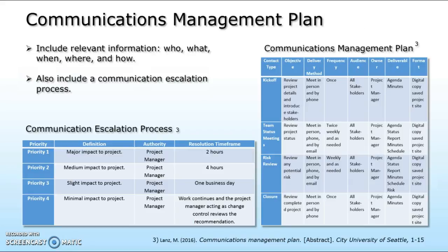A communications management plan is a document that provides a collection and filtering structure that details what methods will be used to gather, store, and escalate various types of information. Procedures should also cover collecting and disseminating updates and corrections to previously distributed material. It also includes a distribution structure that details to whom information will flow and what methods will be used to distribute various types of information amongst other things.